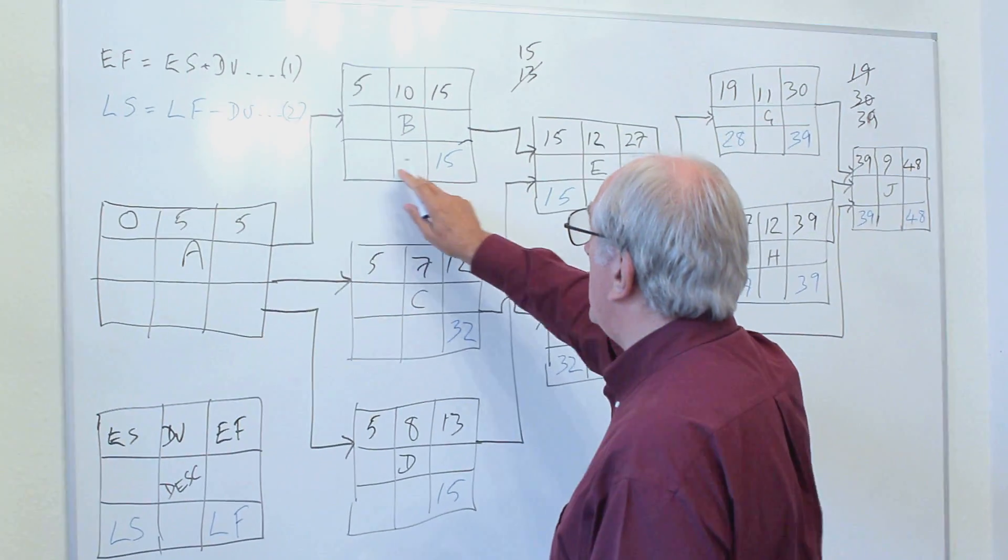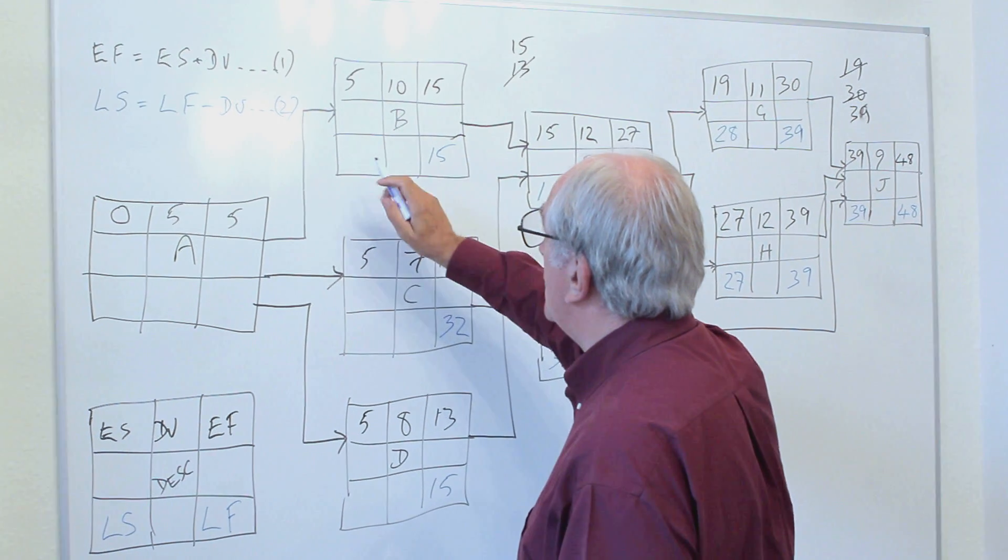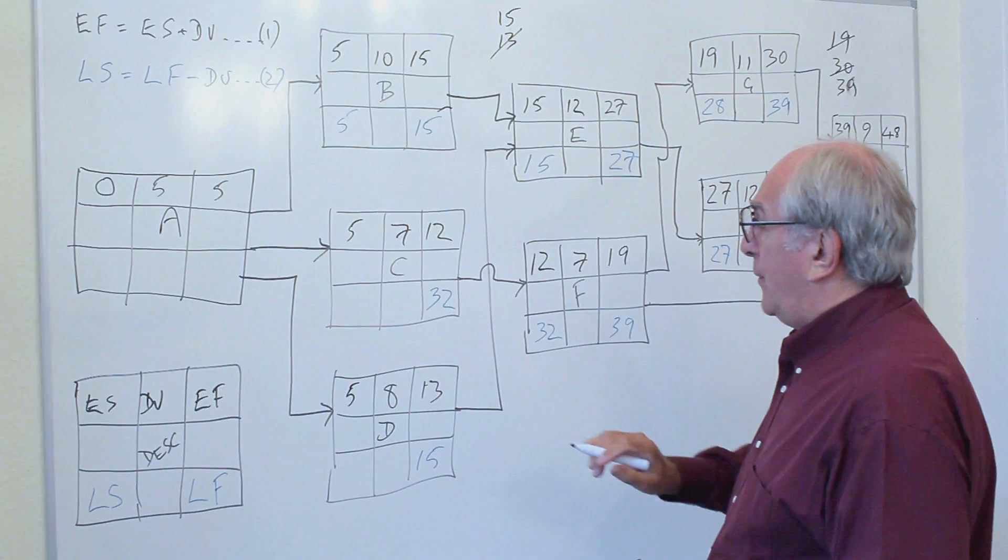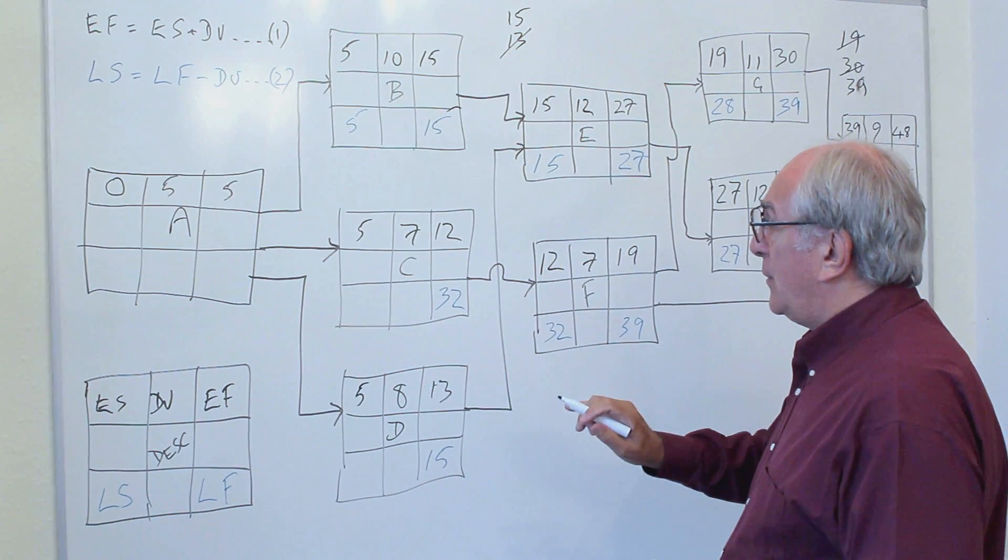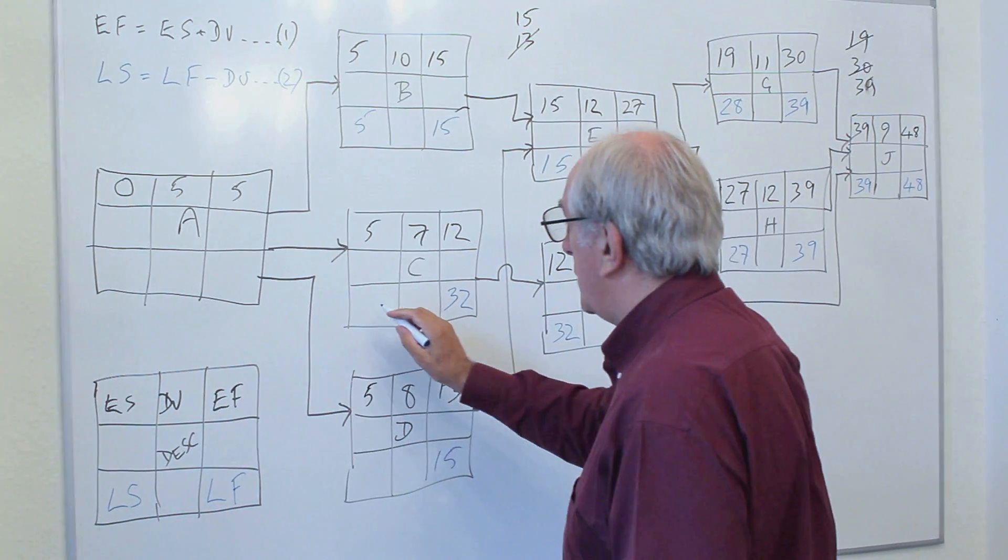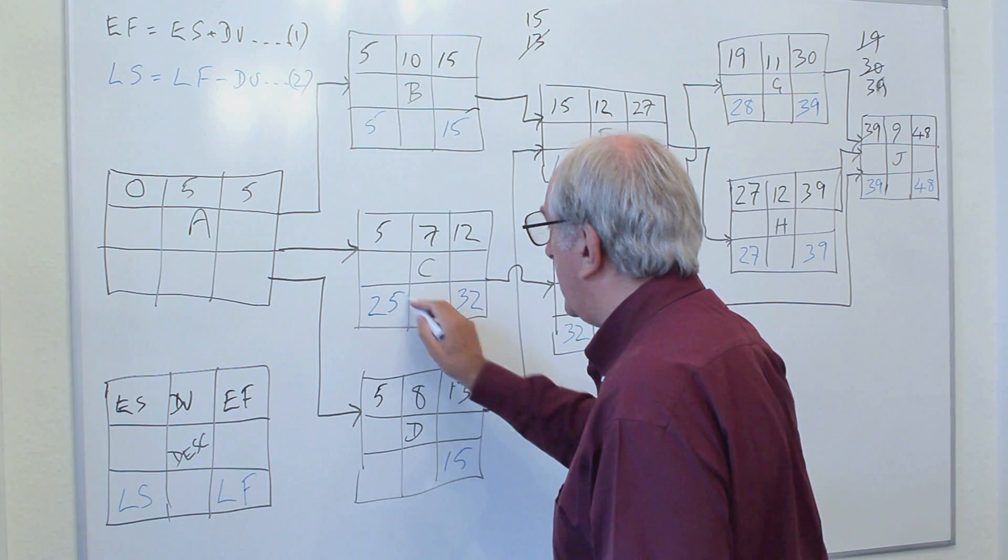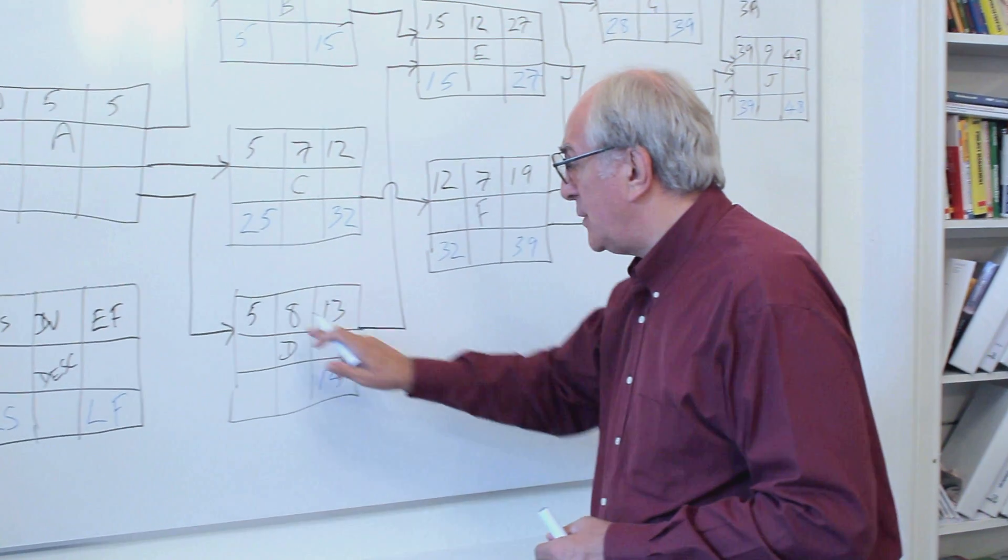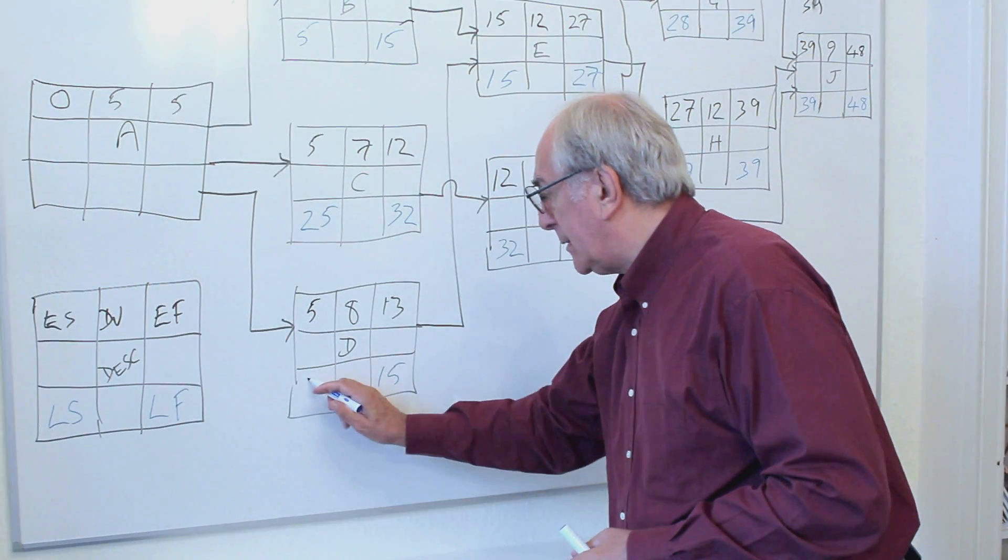So the late start for B is the late finish of 15 minus the duration of 10, which will give us 5. The late start for C is the late finish of 32 minus 7, which will give us 25 as the late start. And the late start for D is 15, its late finish, minus 8, which will give us 7.